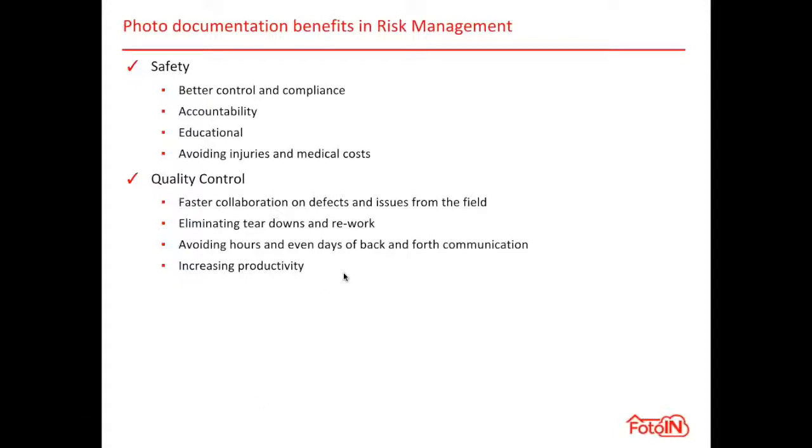Yeah, I was going to say something. We're using the quality control piece right now. We've got a project team that has a question, an RFI in the field, and they're able to take a picture of it, ask the question, annotate the picture, and send that straight to an architect and get an answer. We've been able to cut days out of RFI loops.